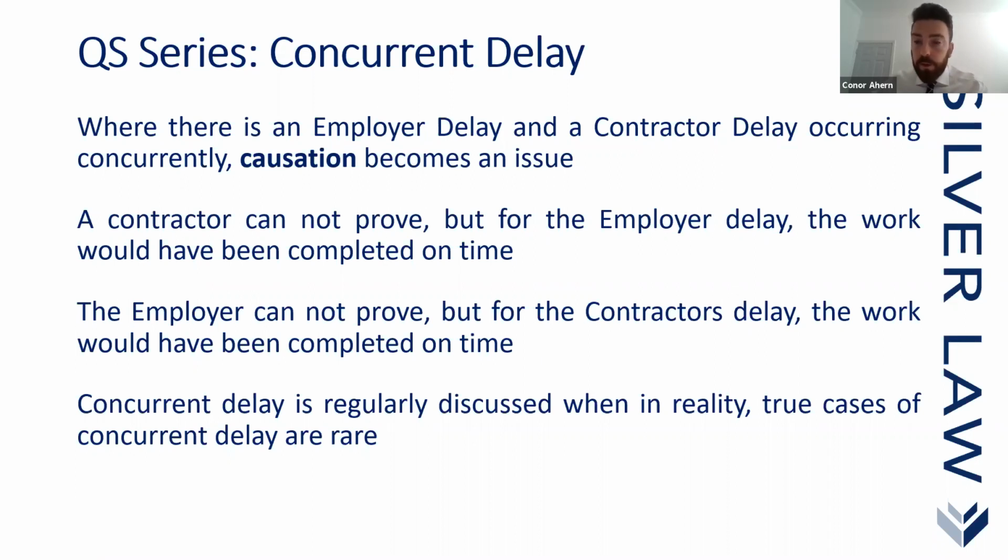And I imagine a lot of people in practice come across this quite often. And we'll come on to the points about dominant cause. Of those two events, it's more than likely that one over the other is the actual cause of the delay to the completion date. And causation is really the big point when we're looking to prove our concurrent delay.